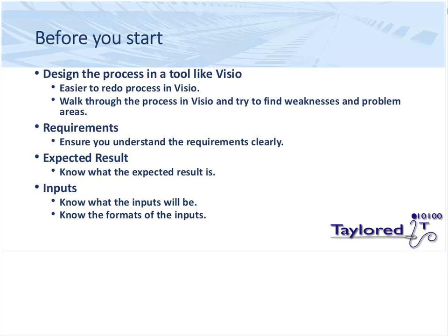And the best way, actually, is to put time aside in your project plan where you don't even log into PAM and just work on this type of information. I know it's not the exciting stuff to do, but at the end of the day, it's going to save you a huge amount of time and effort.